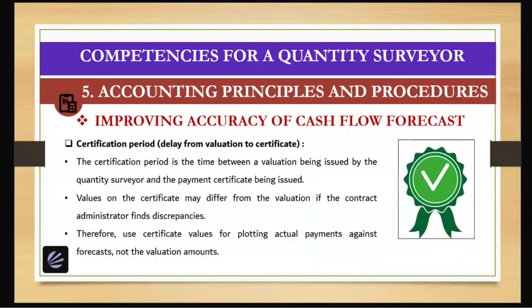Certification period, that is delay from valuation to certificate. Now, the certification period is the time between a valuation being issued by the quantity surveyor and the payment certificate being issued. Values on the certificate may differ from the valuation if the contract administrator finds discrepancies. Therefore, use certificate values for plotting actual payments against forecasts and not the valuation amounts.